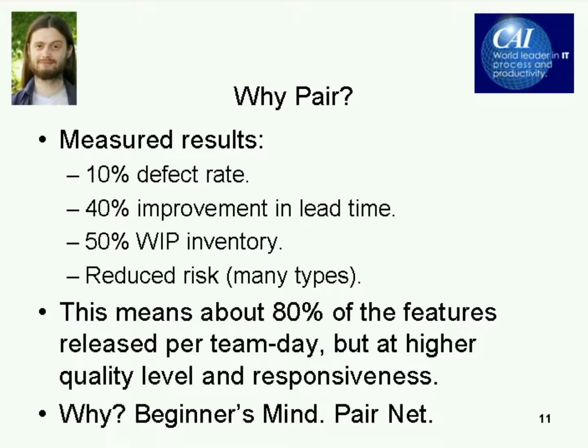So I alluded to this a little earlier, measured results of why pair. So I mentioned the improved lead time and that you get about 80% of the stuff done per man day, features done per man day. However, one of the things you'll notice very, very quickly is quality improves dramatically.